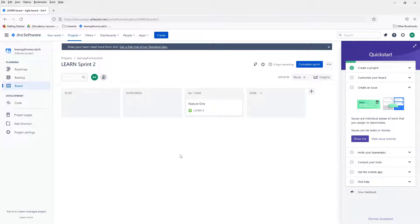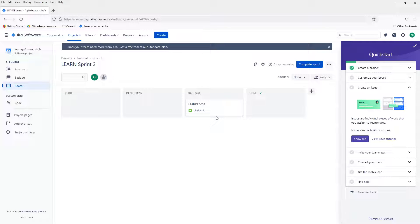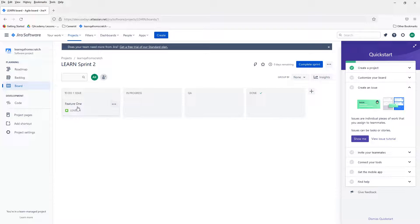Then it moves to QA, which also has a WIP limit — maybe not more than three as well, so you can test three stories at the same time. If there are more, it lights up red and there will be a conversation about why. Then it moves into done and it's complete. There are no sprints in Kanban mostly — there could be some release dates or epics with an expected delivery date, but it's not working in a sprint manner. It works by moving stories from the left side of the board to the right based on priority, and it is continuous work and continuous delivery.